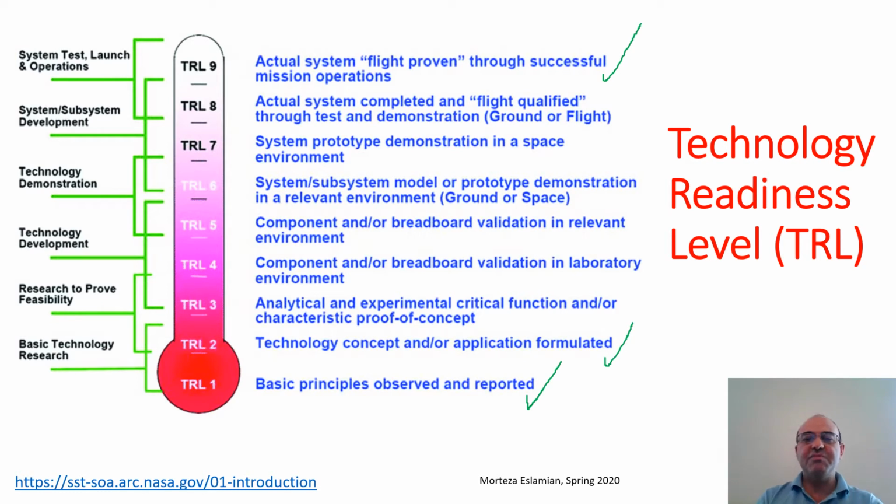So essentially, it's better to start from technologies or thermal solutions with higher TRL, and then if they are not adequate for that particular mission, then we would need to go to concepts with lower TRL, and then continue the development to bring the readiness to higher levels.